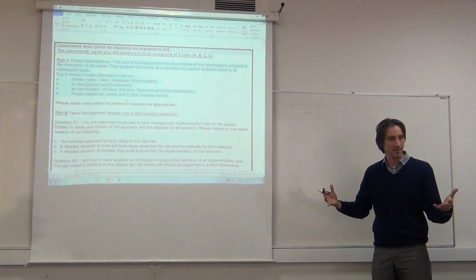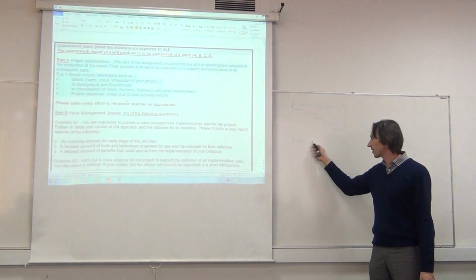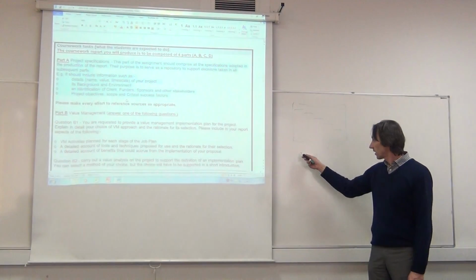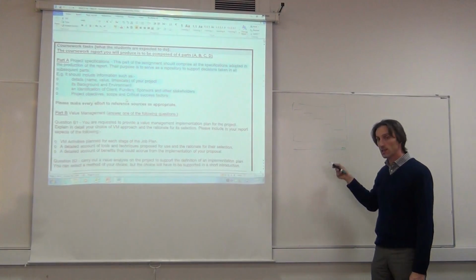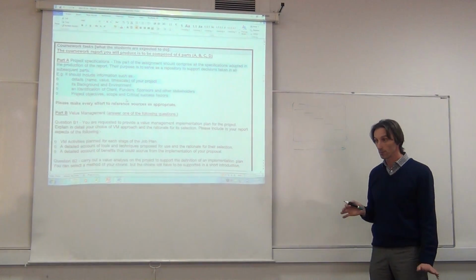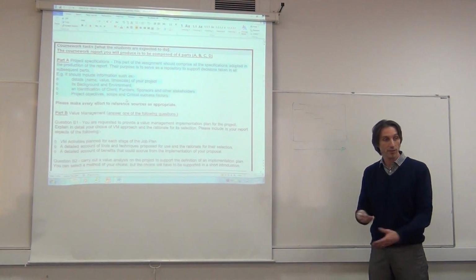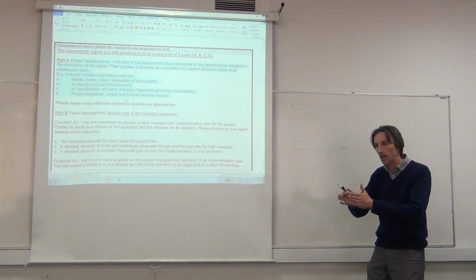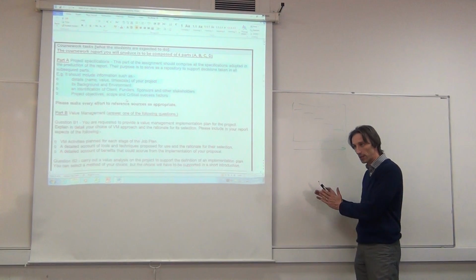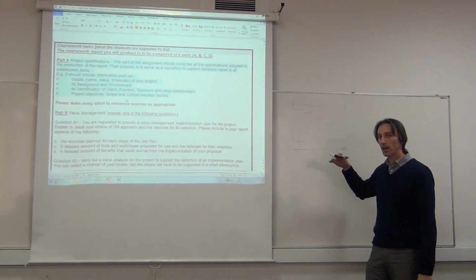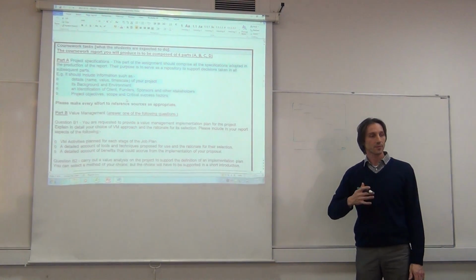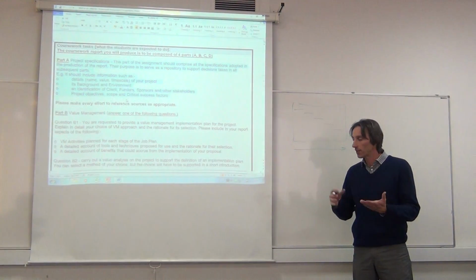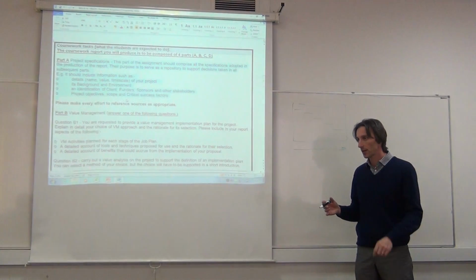So you can rely on the environment to stay the same. Now, in an IT project, if you were to rely on things to stay the same for 10 years, you will be screwed, big time, because 2 years on, everything is changing around you, okay? So you cannot have the same type of calm and paced behavior for the whole 10 years. So this has produced a different IT governance for IT projects, a different project governance for IT projects.